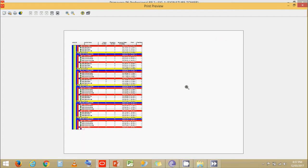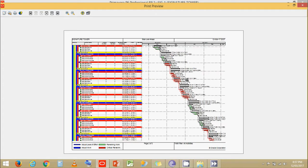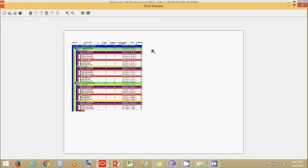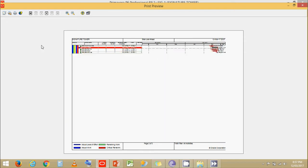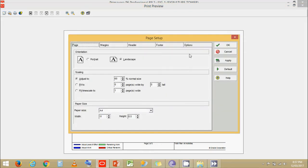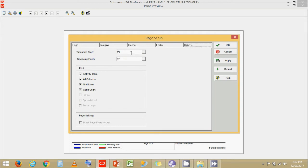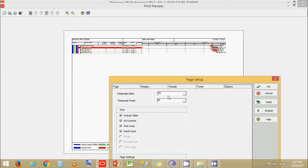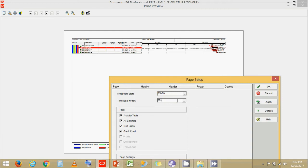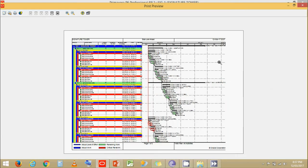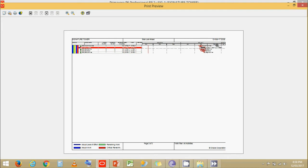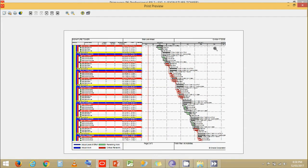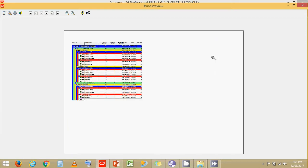Now in order to make it a better view. Let's do some changes. Let's say time scale is from project start minus 2 weeks. And say time scale finish is project finish plus say 4 weeks. Click on okay. Now you see that the Gantt chart starts slightly ahead of the corner. This is just for better presentation and ends a bit earlier or before than the end corner. This is just for presentation. It looks better.